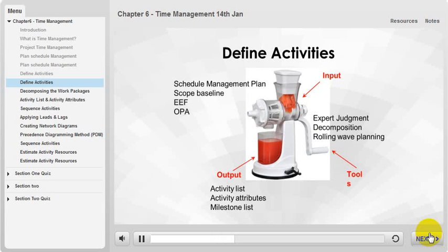to recording the activities. When you create your WBS, you decompose the work to create work packages. Using rolling wave planning is common when identifying all the activities and developing the schedule. With this approach, you can see how the process of planning and developing the schedule occurs throughout a project. Usually, your team members identify the activities needed to complete the work packages. They have the subject matter expertise necessary to identify all the steps and all the work needed.